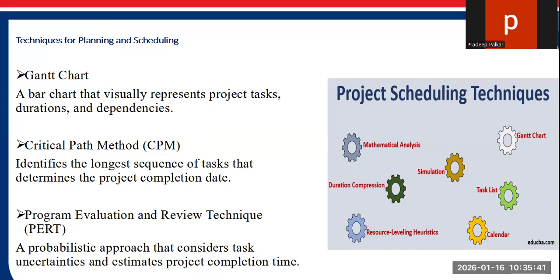And the third technique is the Program Evaluation Review Technique. What is the advantage? It is used when activity durations are uncertain. It uses three time estimates: optimistic, most likely, and pessimistic. See, this is the importance of planning and scheduling.